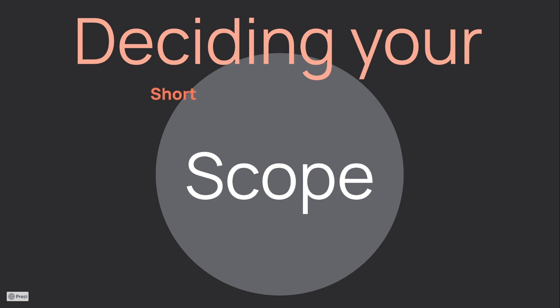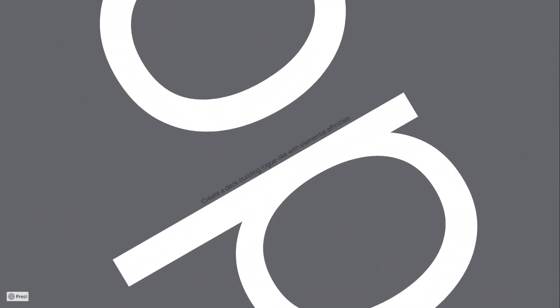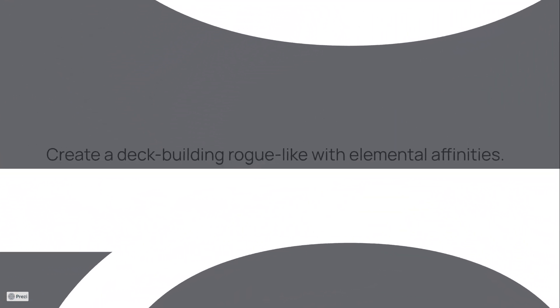It needs to be short, simple, and especially at the beginning, vague. For instance, in our other tutorial series, we are going over how to create a deck-building roguelike card game. Our scope statement is going to be something pretty simple, along the lines of: create a deck-building roguelike with elemental affinities. So we have our action — creating this game — some specifics like deck-building roguelike, and then something unique: a focus on elemental affinities.